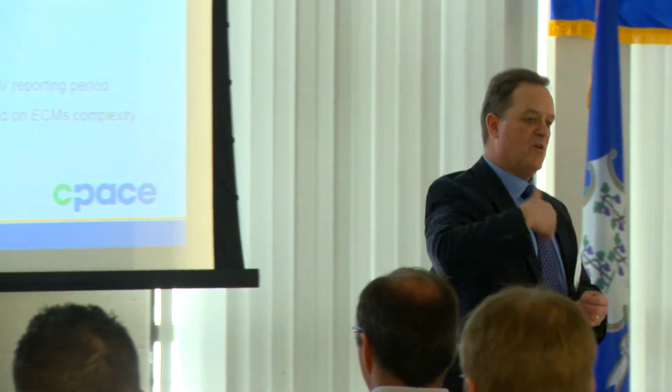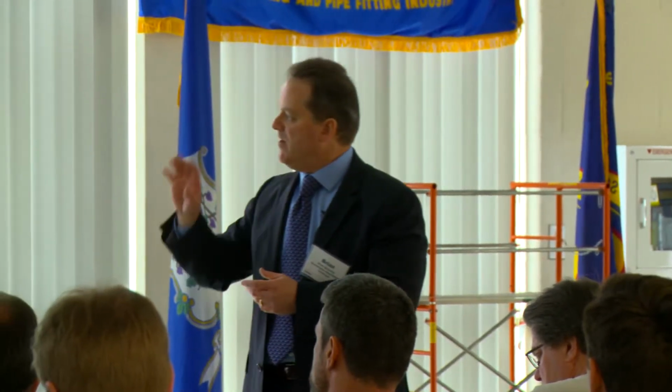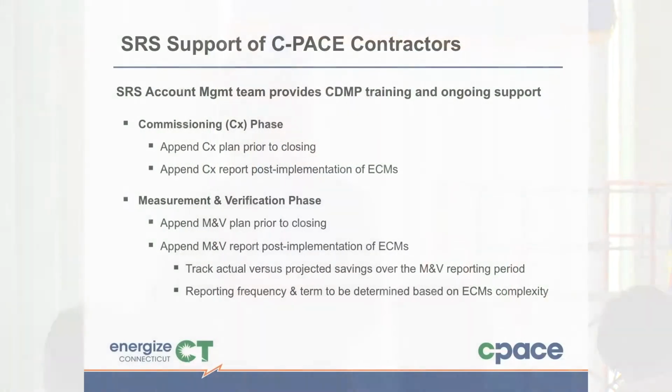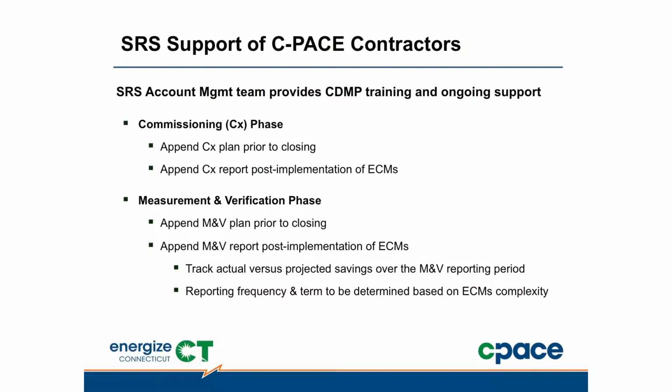And then it is also an opportunity from the consultant or the contractor's point of view. If you recall, one of Anthony's comments this morning was that M&V and an O&M contract fee for up to 5 years can also be included in the financing, assuming that, again, the SIR works on an overall basis. But it is an opportunity for you to stay on board after the closing of an installation of your project so that you can measure and verify the performance.